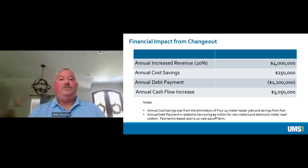So the financial impact from the change out in the city of Gulfport, and keep in mind, city of Gulfport's small compared to a lot of these cities that are taking part in this webinar. We had, like I say, 26,000 meters in the ground. And from when the meter change out was substantially complete, we experienced an annual increase in revenue of $4 million. I was thinking it was going to be somewhere around two. Half of that is what I went into the plan presenting, but it ended up being 20%. Annual cost savings, $250,000 there. I think we eliminated four meter reader jobs that we never replaced.